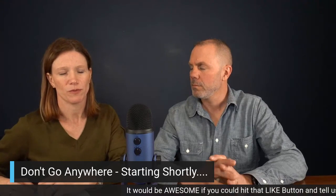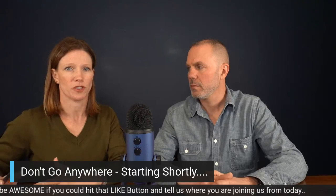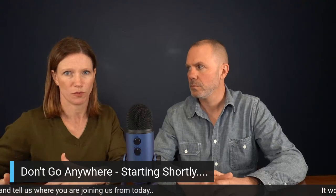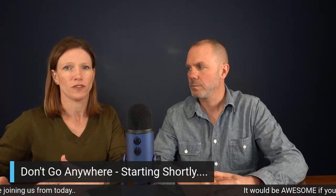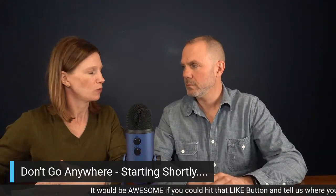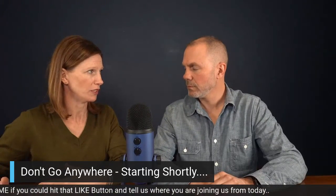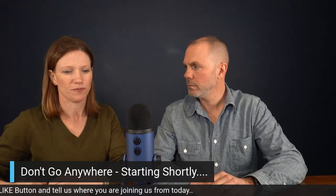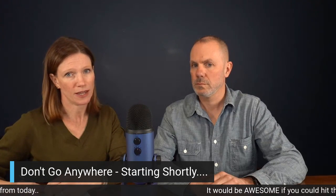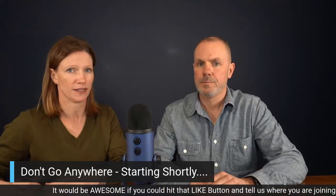Definitely. We've developed some amazing checklists on all of these topics, actually, in terms of an intake form, questions to ask the client in terms of what's important to them. We've also developed checklists for when we go to that site to make sure that we can get there and what we're designing really is appropriate for that site. And access points. And keep in mind that there could be more than one way to get there. The way the crow flies isn't always the best way to take the trucks.